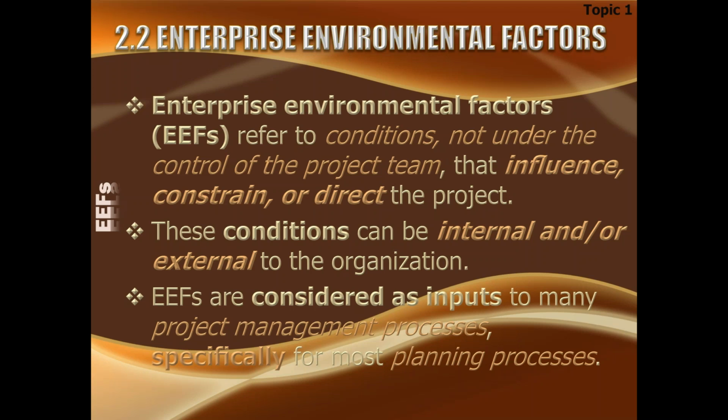Like, when the project starts and we have to develop a charter, I need to have a lot of things coming from the stakeholders. How does the stakeholder think about it? What is the pressure from the customer side and things like that? What are the government policies, how should this be done? So even writing a charter would entail catering for a lot of enterprise environmental factors internally as well as externally. Internal culture, internal style, this also will impact you.